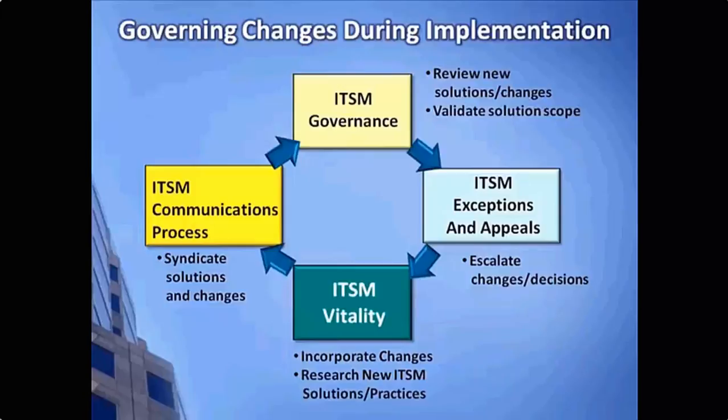Requests for scope changes come into the process, they go through a review board and are either accepted or rejected by the committee. The purpose of having an approach like this in advance and as part of your implementation effort is that political pressure will now be removed from the team members so they can focus on implementation activities. The review committee should have a senior executive doing decision making and representing different business units to make this work.